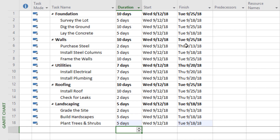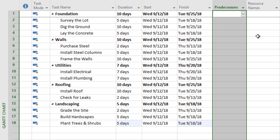Now that we've defined all our project activities and given them durations, we've got to tell Microsoft Project the right order of events — the sequence of project activities. We want to make sure they're done in the right order, so we've got to add predecessors. Predecessors are activities that must come before something else. An example is that you have to write a document before you make edits to it, so writing would be a predecessor. Just like with durations, we're only going to set predecessors for the lowest level activities — those things not in bold.